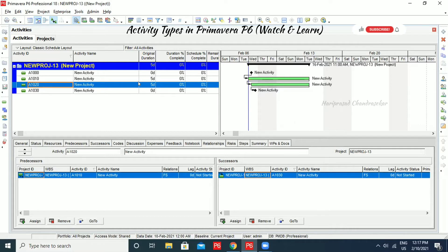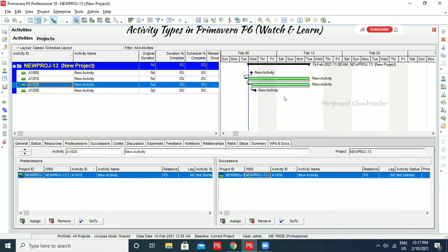Now we have two activities in between having five days and five days duration. After assigning relationships, we should go for scheduling. Scheduling means we can input the date and based on that our project will be automatically scheduled. The shortcut for that is F9, or we can click this button.